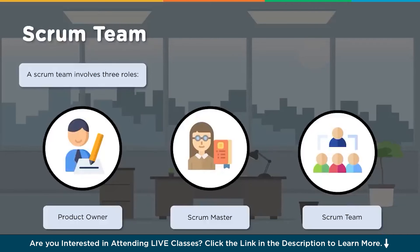The scrum team involves the product owner, scrum master, and scrum team - each having their own objectives. These roles cannot be merged; for example, the roles of product owner and scrum master cannot be given to a single individual because it conflicts the objectives of both roles. Having one team member become both scrum master and product owner will not give the required results.